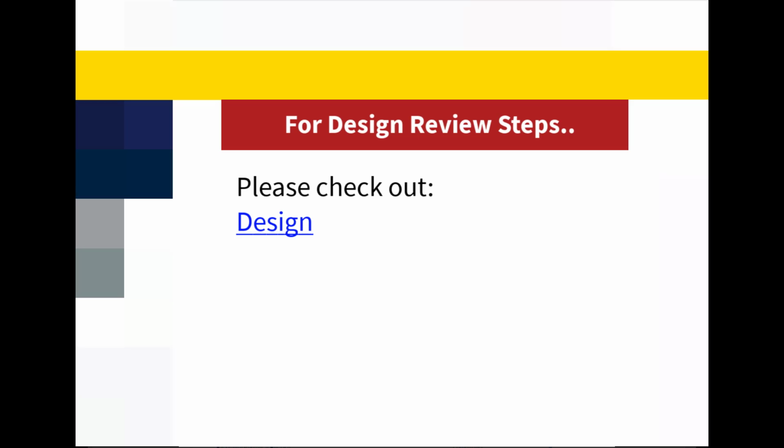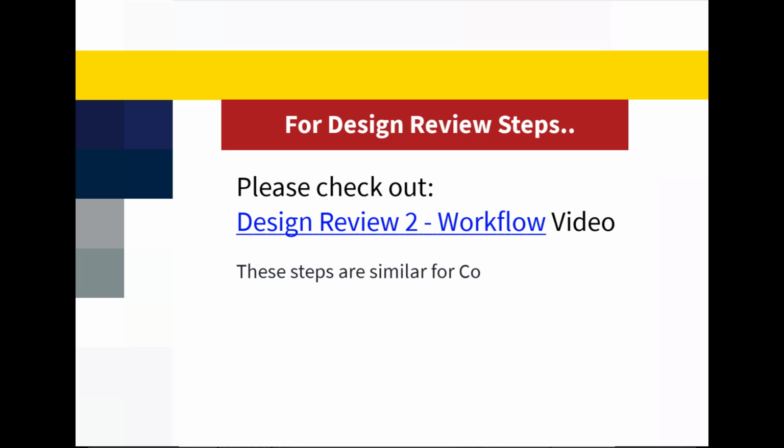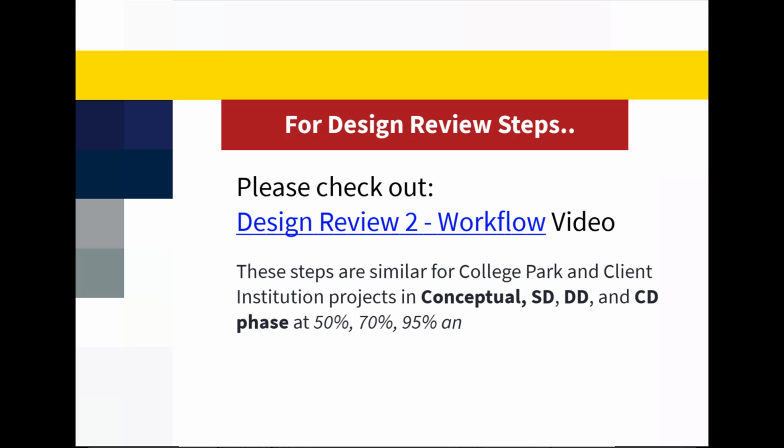The following design review steps are similar for College Park and client institution projects in conceptual, SD, DD, and CD phase at 50%, 70%, 95%, and 100%. Again, these stages may vary from project to project.